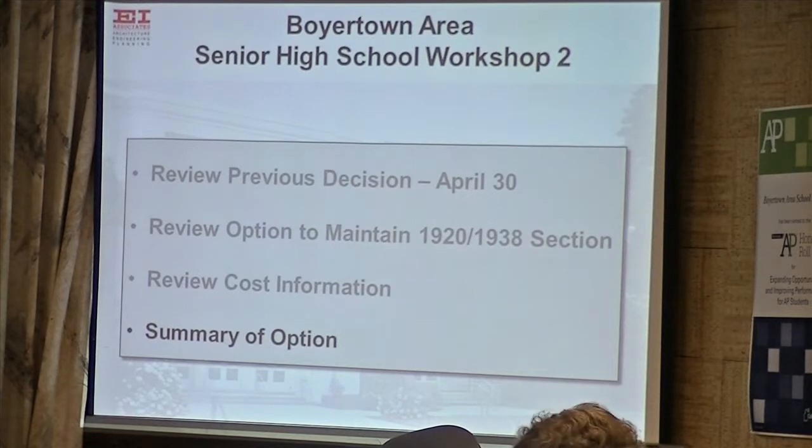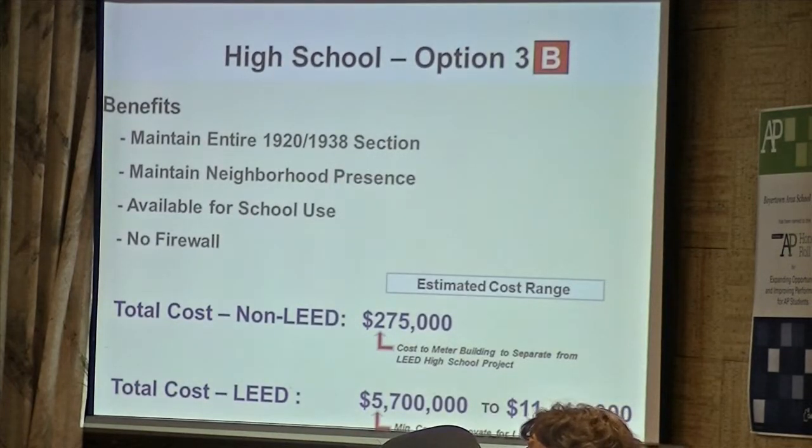Right, but what you're saying is we're through using that building as a transition academic use building, that at some point in time, we have to either have separate utilities or metering if we want a LEED and all of that. So backing into that, do we have to do work there at the same time we're doing our project? If you knew what was happening before you went out to bid, we would include it in the bid. Okay, so that would obviously save some dollars. That would clearly be nice to know if you knew what you were going to do when you went out to bid.